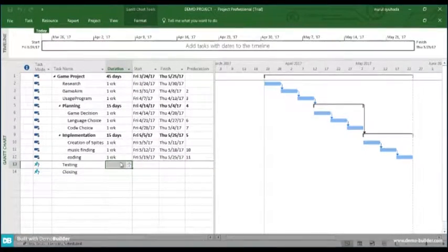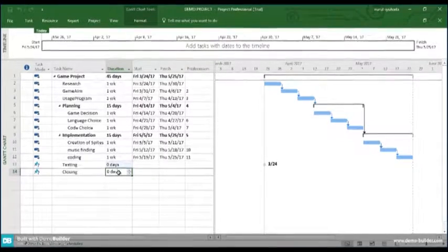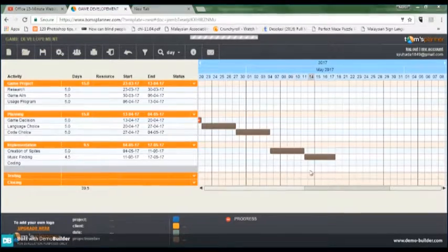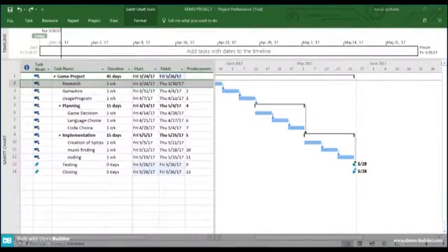For Microsoft Project, when planning a project, aside from laying out the tasks that take you from the beginning to end, you are inevitably going to want to mark key dates along the way. One easy way to do this is through the use of a diamond-shaped symbol in your Gantt chart, which is the milestone. Compared to Tom's Planner, since Tom's Planner does not have dependency enabled, milestone tracking cannot be done.